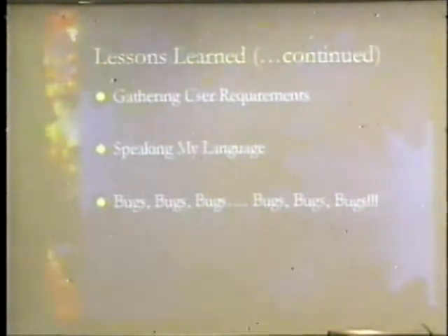Another lesson I learned was gathering user requirements, and speaking my language is basically the same thing. I felt like I was talking to Dr. Mastella, but in a different language. I thought I was talking in Chinese or Korean or whatever. He didn't understand what I was saying, and he did not get me. I was wondering why, and when I was thinking back, I realized that I was talking too technical, talking more about the data instead of finding out what he actually does on a regular day, what his processes were. So after a while, I decided not to listen to him as far as data manipulation goes, and focused more on what he does, how he collects things, and how he displays it to other people.